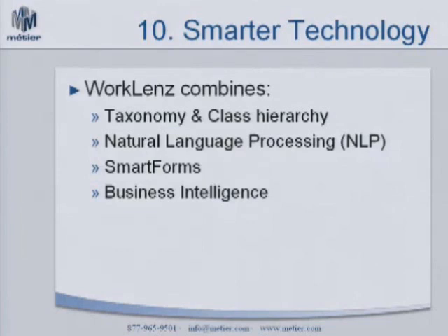Yeah, yeah. That's actually one of the things I'm going to talk a little bit about here in the business intelligence piece. So we're on the same wavelength, I think. But yeah, absolutely, because you've got projects and some are going to have higher value. At one point in time, there may be more importance placed on resource demand or resource capacity when you're looking at projects. 6 months later, you may be more focused on the financial aspect or the value that the project's bringing. So there's different weighting factors that you definitely need to be able to apply. I think that that's a minimum requirement for a portfolio management tool. You have to be able to put different weighting factors in when you're looking at making those types of decisions.